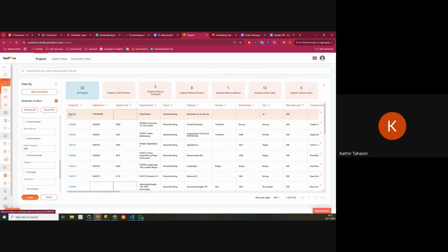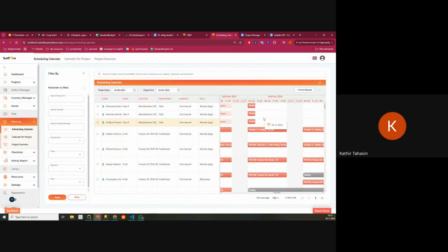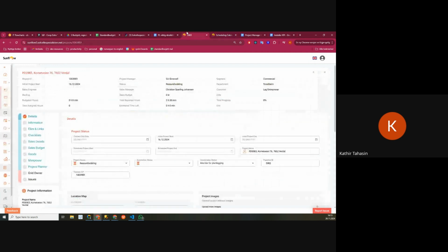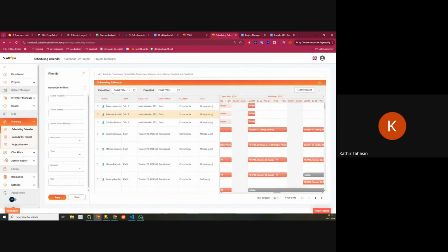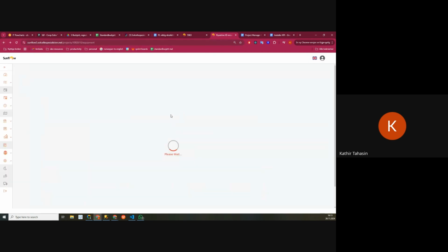How we hope to have it happen is that they set a project start and end date, especially a project start date, and then they will set the status as waiting for planning, so that those guys can come and see which projects are waiting for planning, so that they can plan them accordingly on the different systems, and that can be visible in the project detail page.